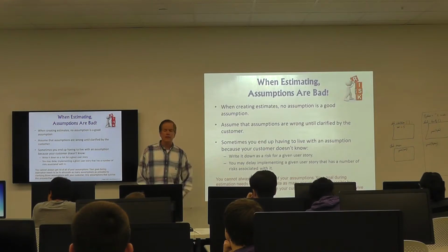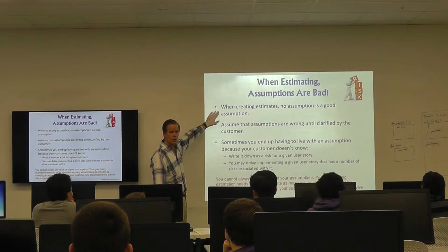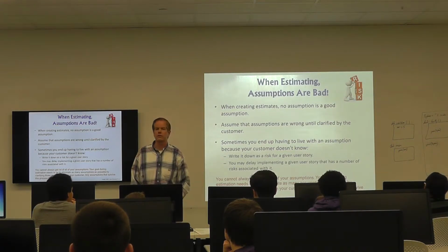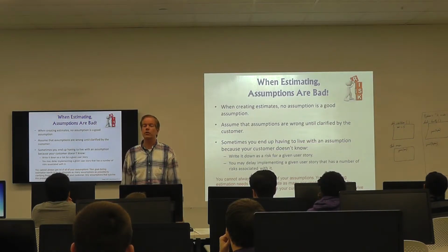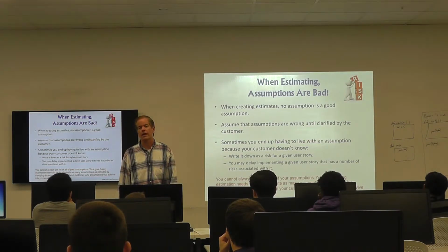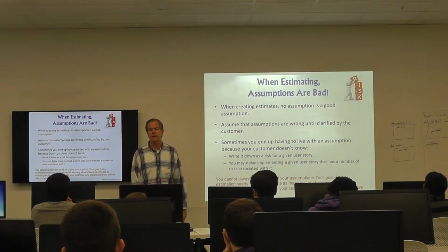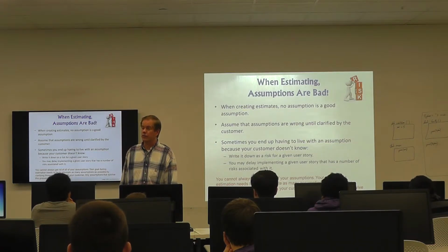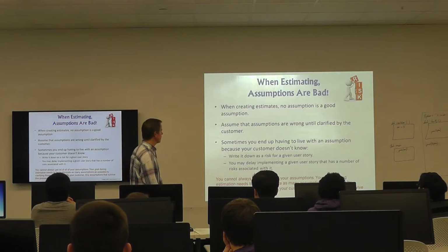Okay? Assumptions are really, really bad stuff. When you're creating estimates, no assumptions is what you want. Assumptions are wrong until clarified by the customer. Remember, if you assume something, well, I assume you'll only use it during the weekdays. Oops, I'm going to use it during the weekend. I assume that you'll stop using it at 5 o'clock. Oops, I'm going to do an overtime sale. I'm going to be using it then. I assume you'll have no more than 100 customers a day. Whoops, you have 200 customers. You make assumptions like that, and they're going to violate it right off the bat.